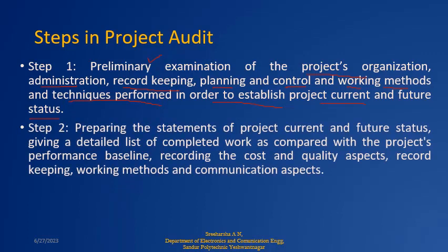In the second step, they are preparing statements of project current and future status. What is the future and what is the present status? Then a detailed list of completed work, what are the works that are completed in comparison with the project's baseline or deadlines, or, as we have already said, some targets.